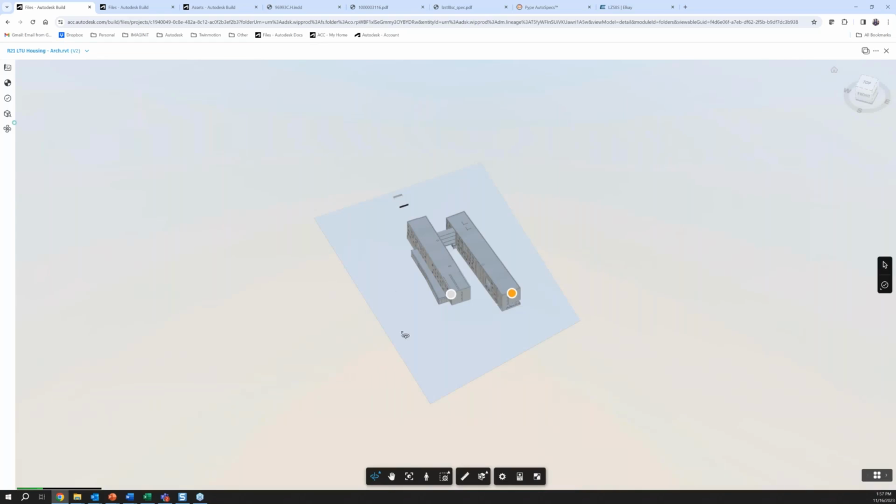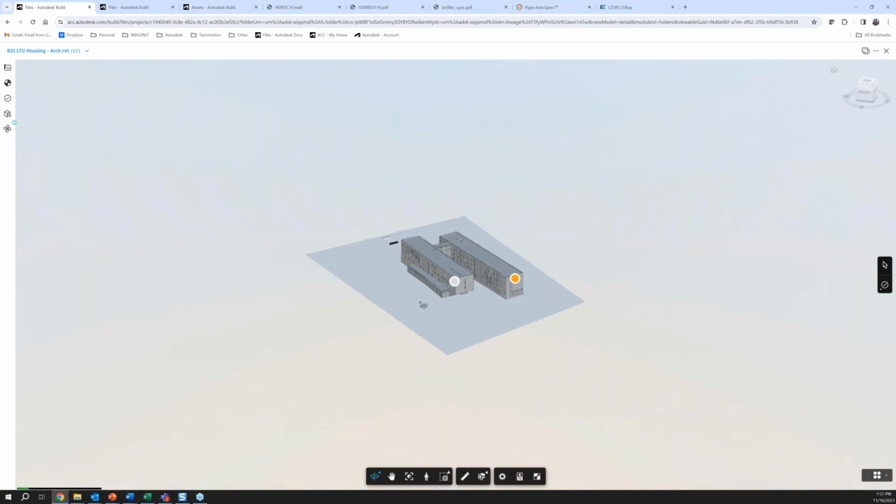so what I wanted to get to with the assets is show you that not only can you associate files, but if those files go through a submittal approval, you can tie the approved submittal to it. And now when we're getting into the commissioning and the handover, all of this information is linked back to the model. And these are the sorts of things that owners are starting to require. That can then be exported to FM data. We can send the attachments with it. There are all types of really cool stuff we can do.